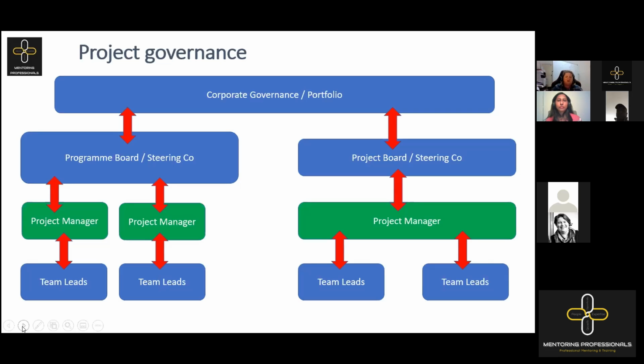When it comes down to quality on both sides, you actually mentioned quite correctly, acceptance criteria. If we're doing our acceptance criteria effectively, we're setting how we're going to accept that the project has delivered everything that it needs to deliver to the specified quality. We need to set it from the outset, right at the very start, and that is something that actually does go into the project brief, and it gets expanded on as part of the PID. Questions so far?